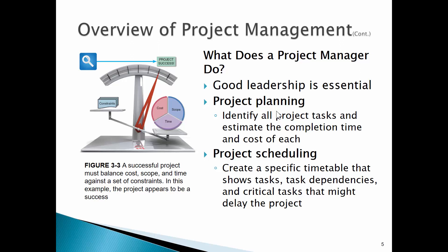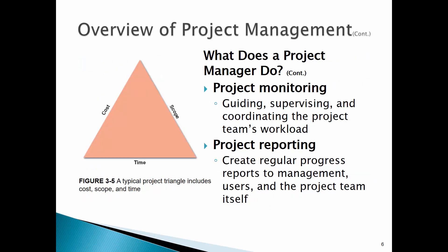Project scheduling - create a specific timetable that shows tasks and task dependencies. We need to be able to present to management the time it's going to take to complete the project. That may get adjusted as the project scope changes, as an increase of time, or maybe we lose a key employee. One of the biggest challenges is when people throw more resources at it - more time, more money, more people. That may not be such a great idea.